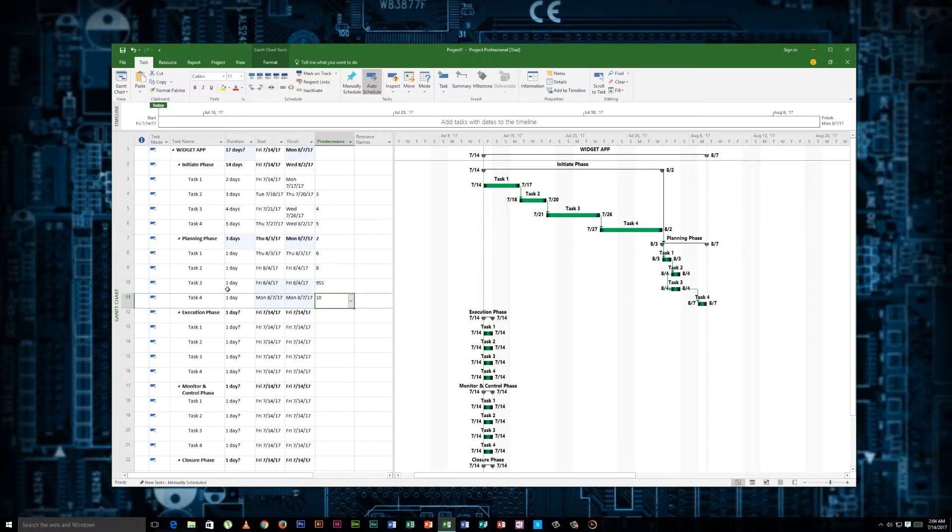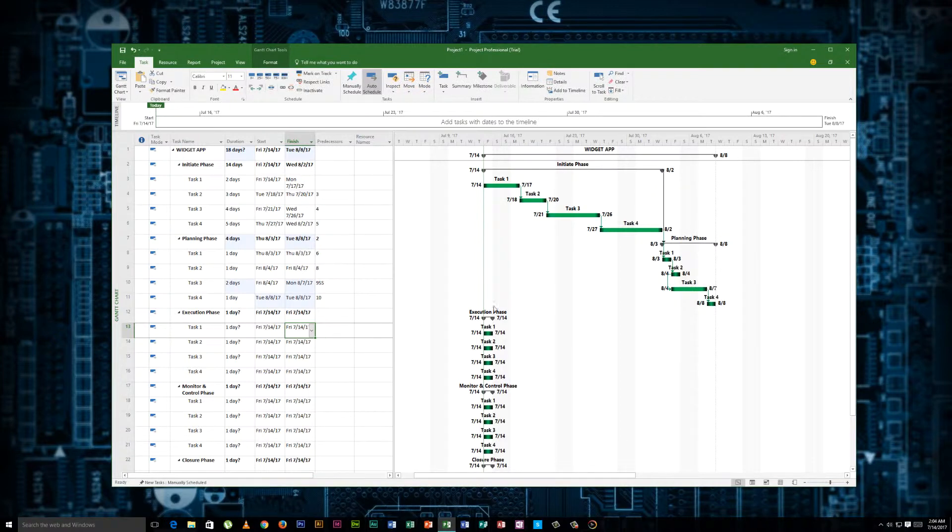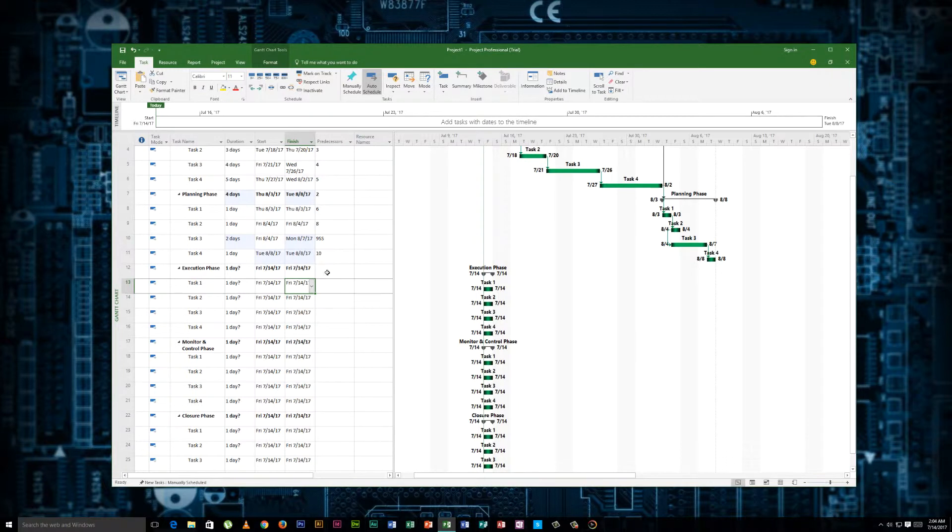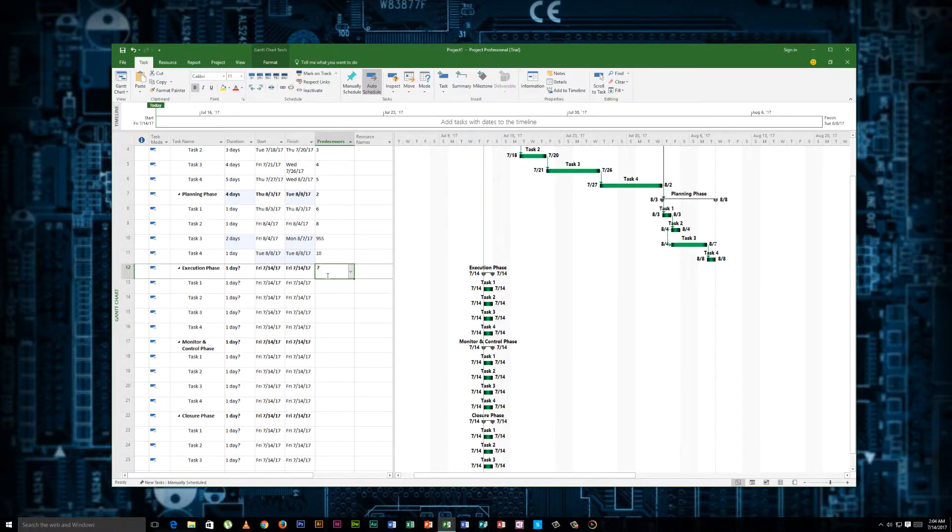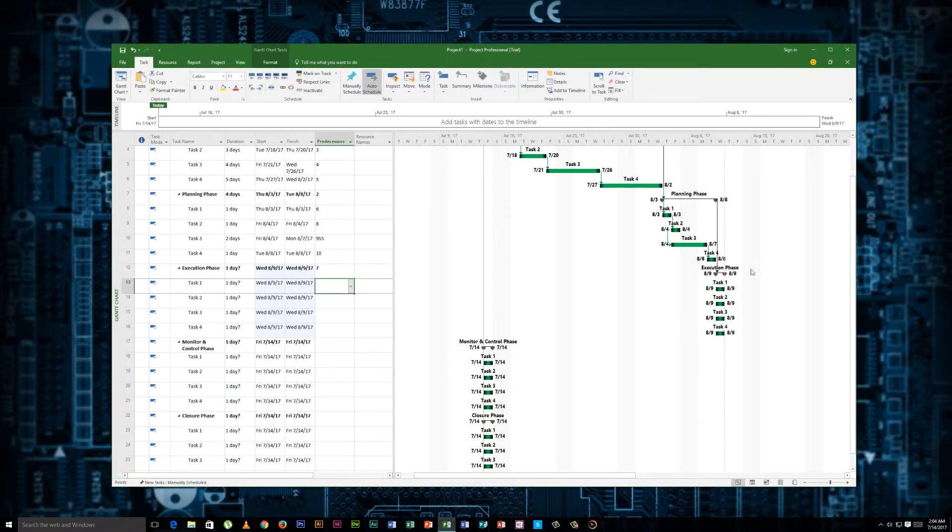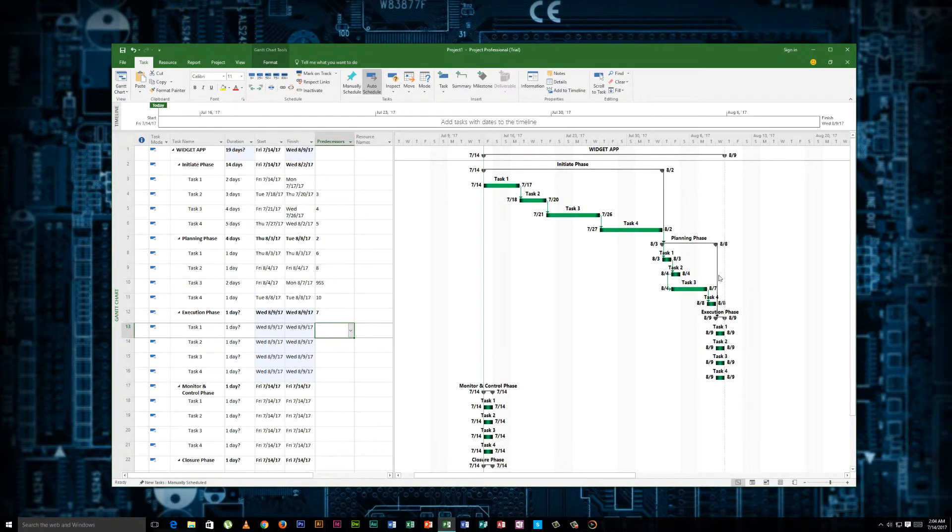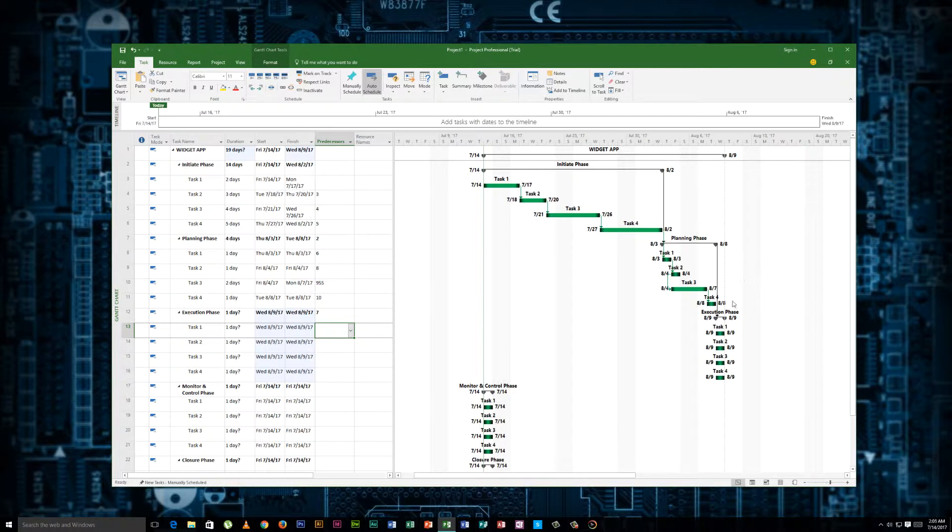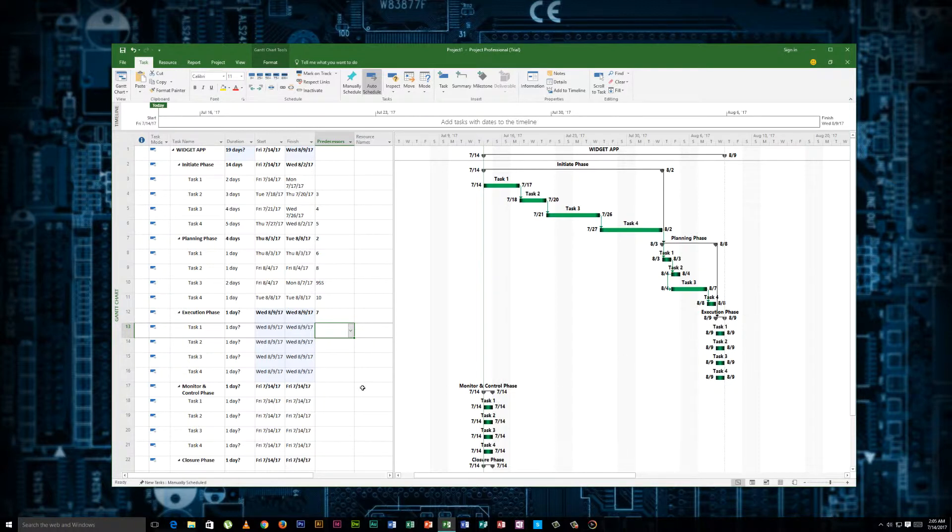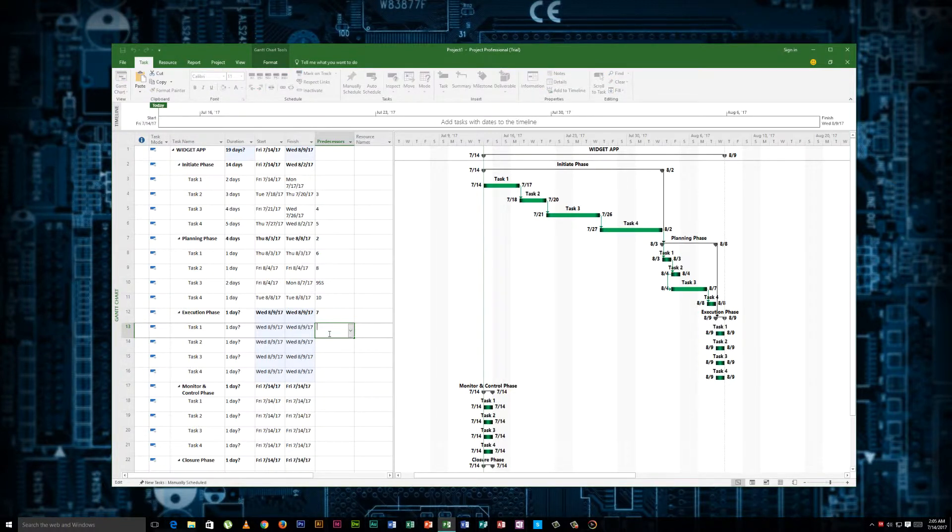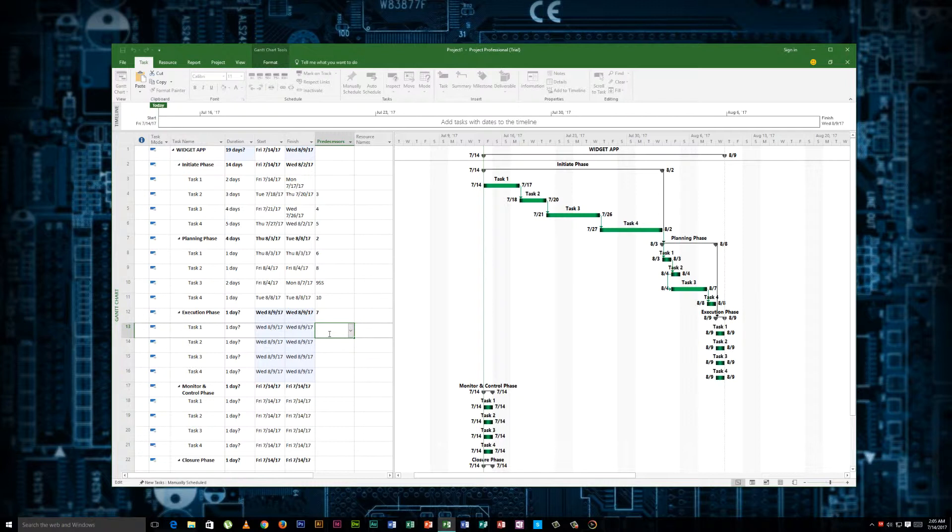Now you can change the duration. It may not complete when the other one completes, and see how it just expanded. This has a dependency on seven, can't execute until the planning phase has been completed. So again, you see our baseline has been pushed out here. Now the overall project baseline is extended as far as the furthest phase, and you'll have a visual representation of that once we finish here.